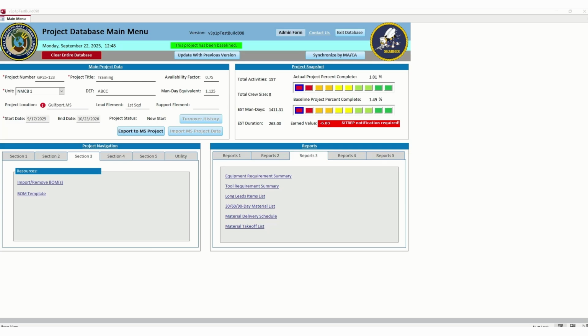In this video, we're going to talk about some common mistakes and some best practices in Microsoft Project when dealing with your level 3. As you see the red men here, you may see some calendars next to it. That means it has a no earlier start date. That's a constraint, so you won't be able to move these because they're a constraint. If you have constraints, and you really shouldn't have constraints, the only one that may be a constraint is move in.